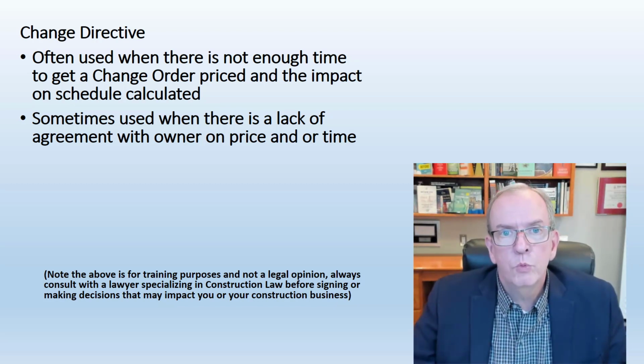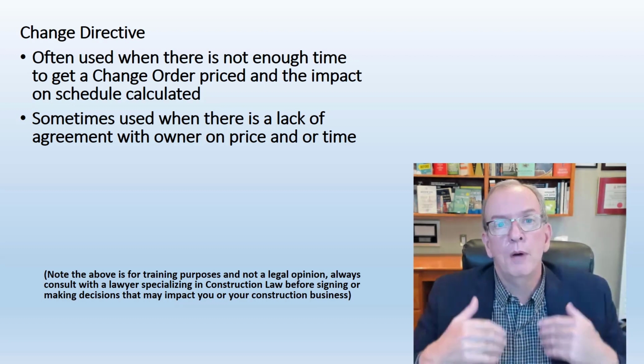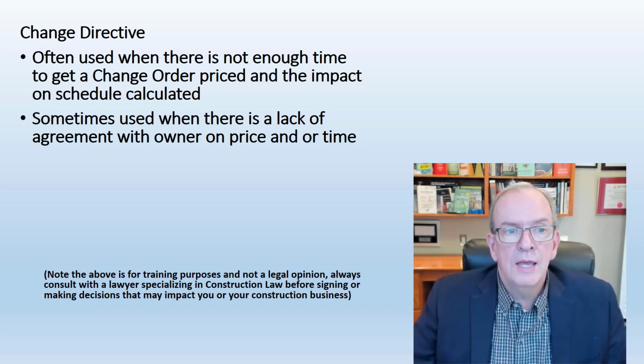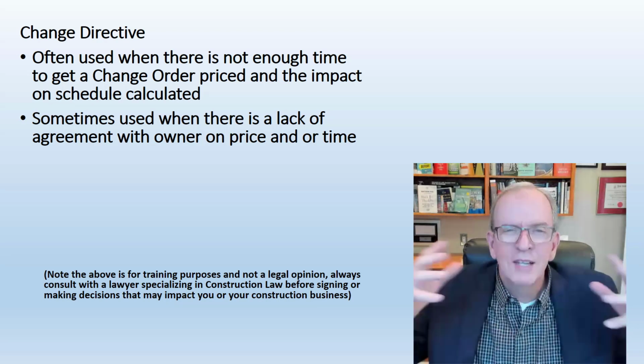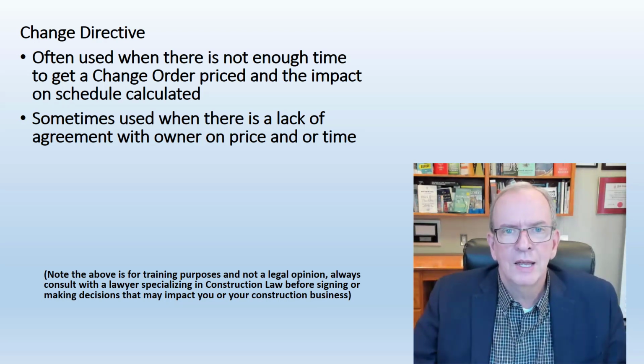And then at a later point, where you've now had time to assess the cost and the impacts on time, it could be made into a change order, which is now signed and agreed to by both parties. So really it's a method of getting the work to continue even though there's been some sort of change in it, and making sure that it doesn't get all bunched up in the project, and that's important. Sometimes it can be used where there's a lack of agreement between the owner and contractor on price and or time. In those cases, it's not such a friendly sort of invite. It's more cumbersome for the contractor.